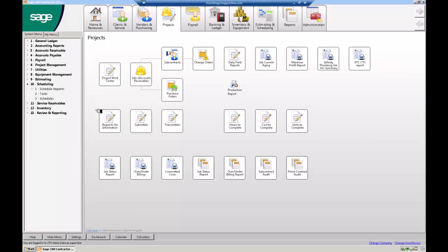We do track vendors insurance. I kind of call it the 3 strikes rule. If I go to create a purchase order or a subcontract and they have no insurance, it warns me. When I enter the AP invoice, it warns me the second time. And when I go to write checks, I have the choice of it warning me or actually putting a hard stop and not even printing the check. Your choice. I really suggest that you do the hard stop and not even print the check until you get that certificate delivered to you. So we do it a couple of different ways.